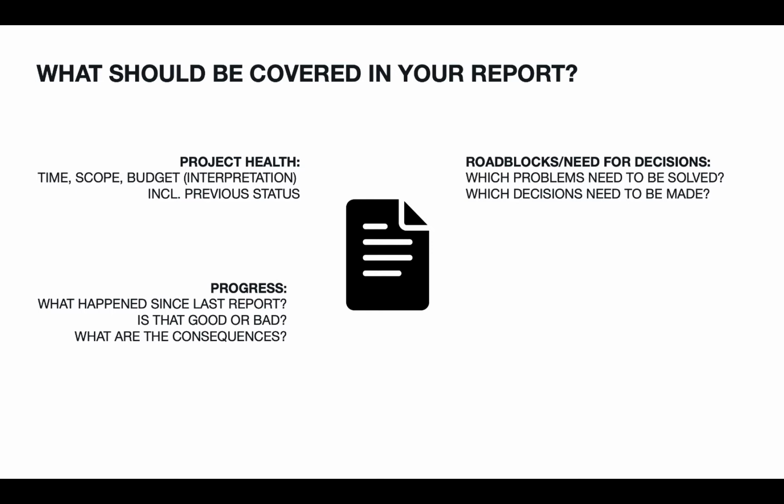Roadblocks or needs for decisions. This is very important if your project faces some serious problems. You need to tell your management which problems need to be resolved and which decisions need to be made, and make it clear if you need their help resolving them.